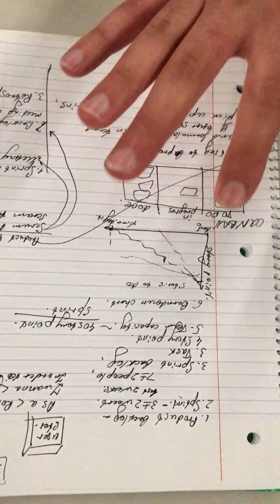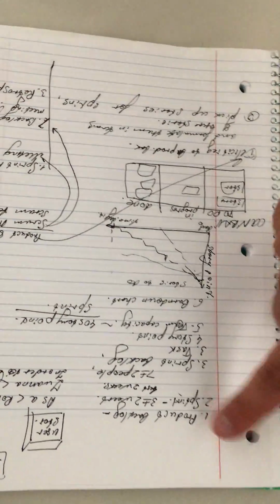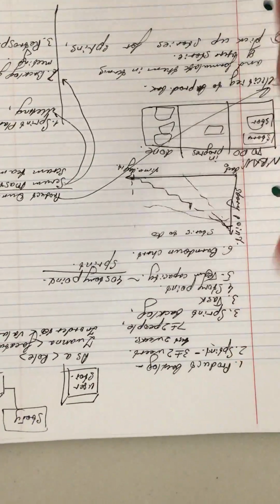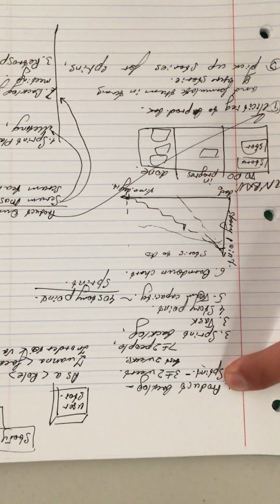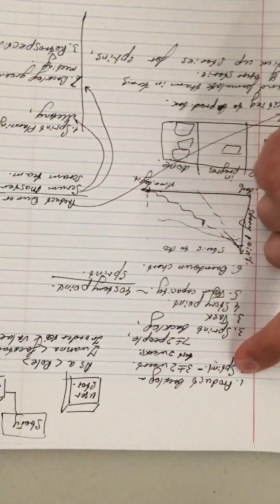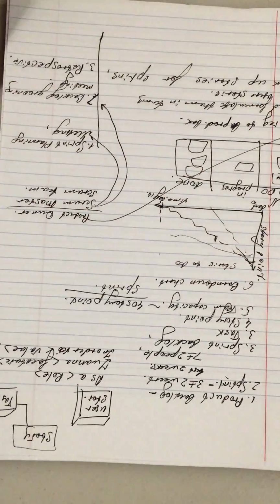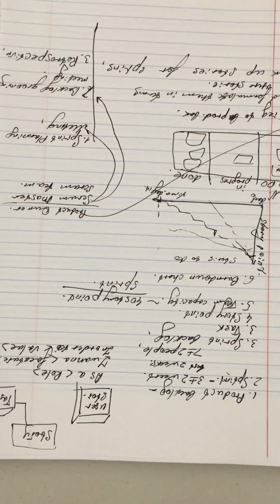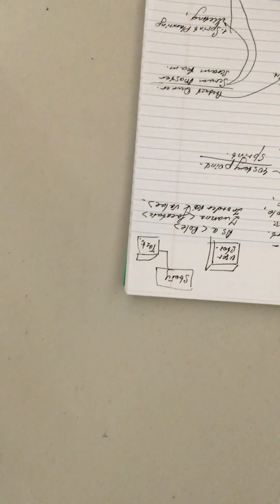Never. And as I told you, as soon as you started the sprint, no more stories come to the sprint. They come then here. What if the customer wants to add some more product requirements? Product backlog. So the customer has requirements and they come to the product backlog. Next the product owner is gonna consider them, prioritize them, and maybe include them in the next sprint. Maybe include them in the sprint that's gonna happen in 6 months. But it's never gonna interrupt the sprint.